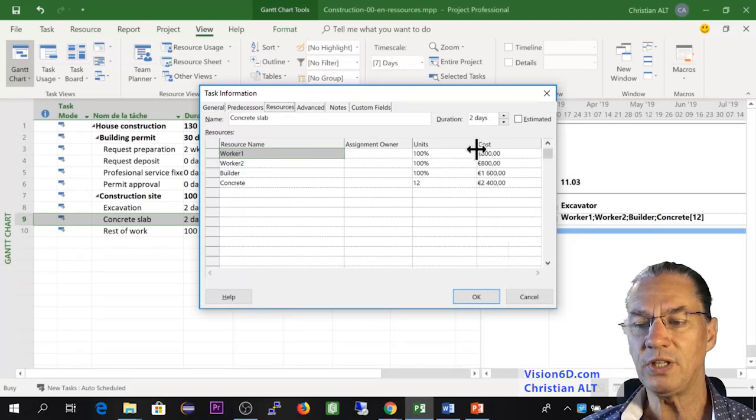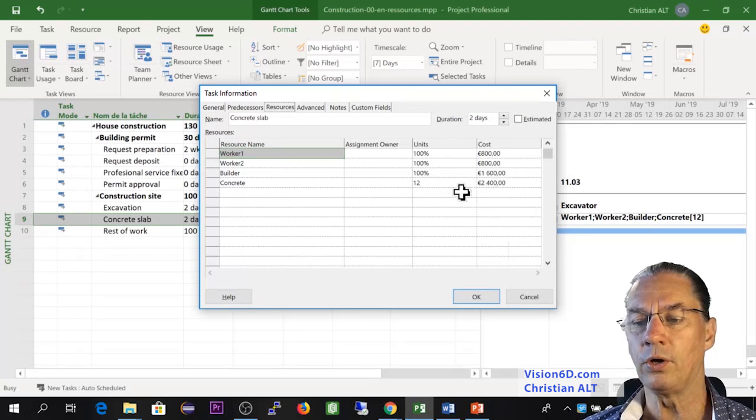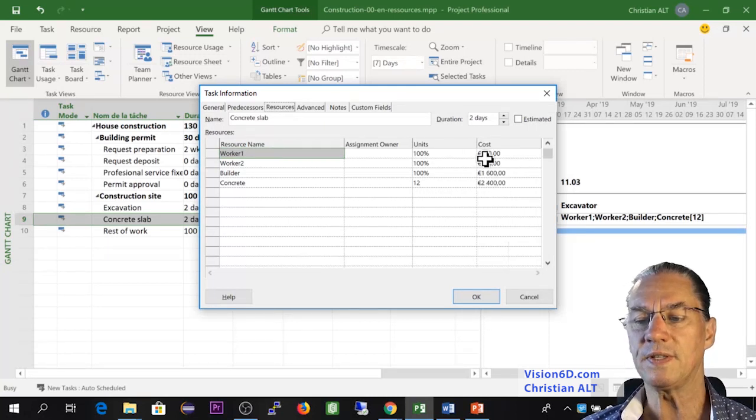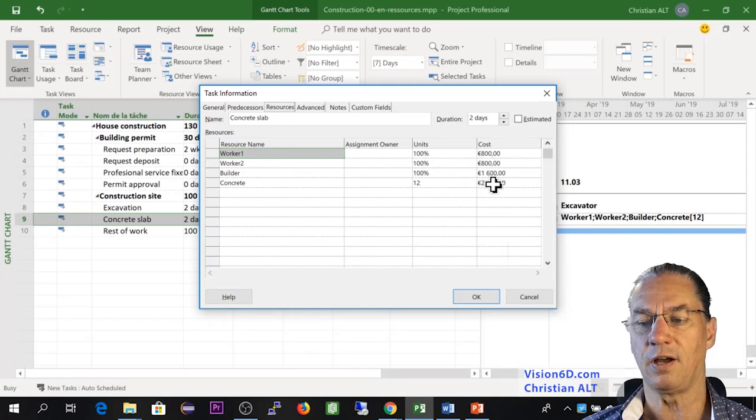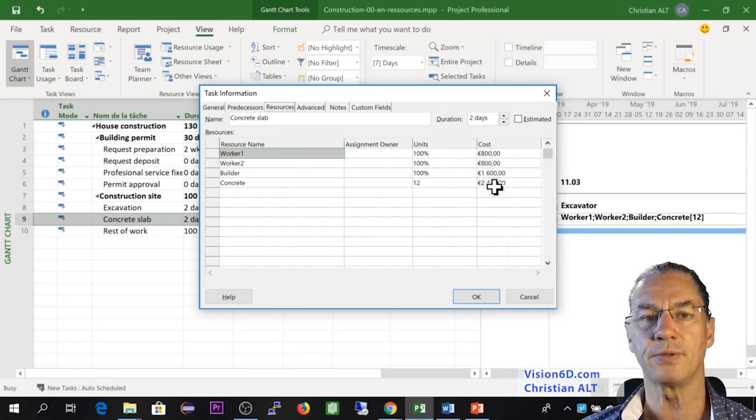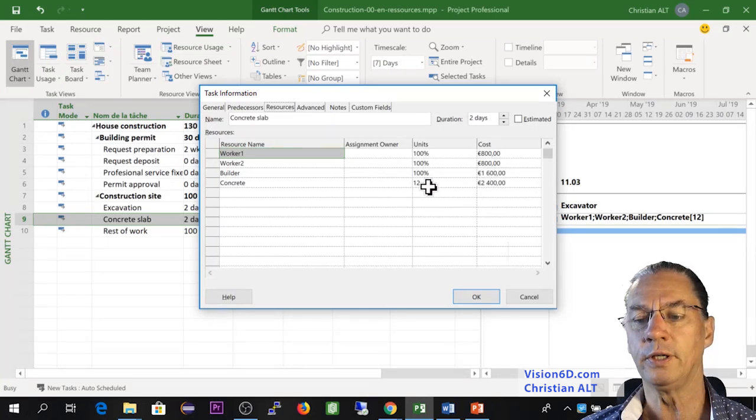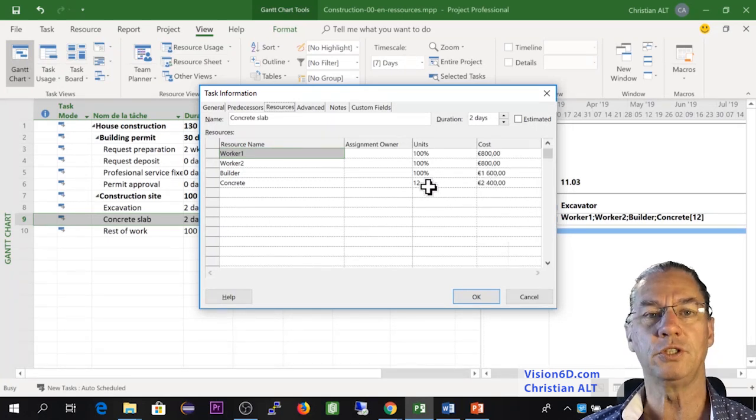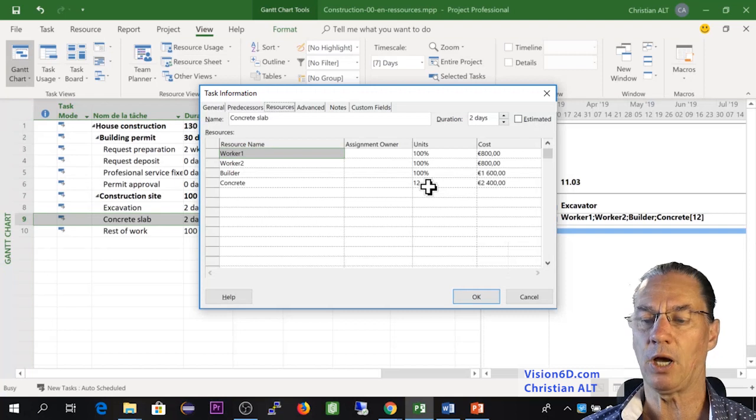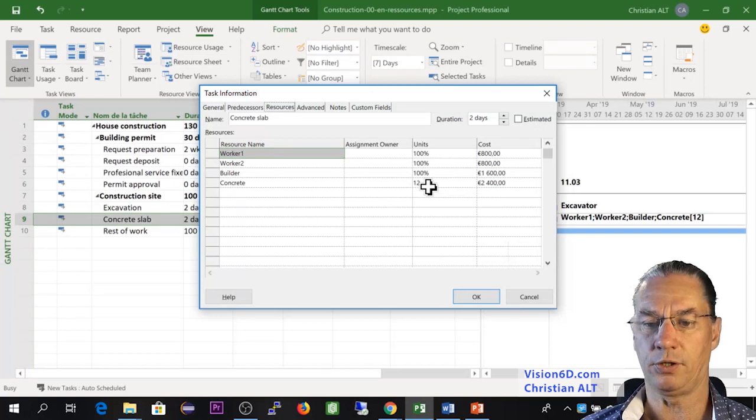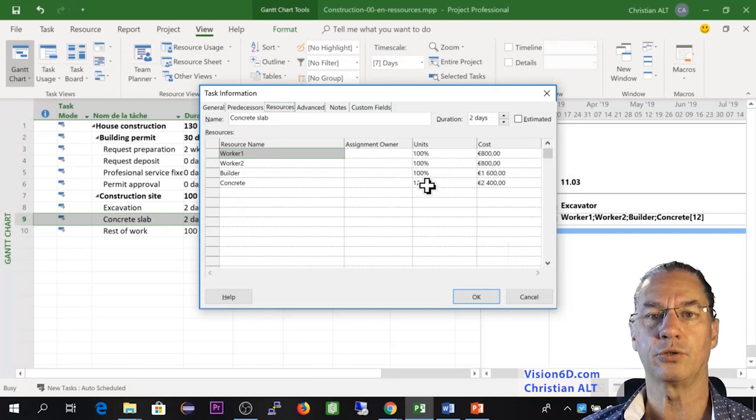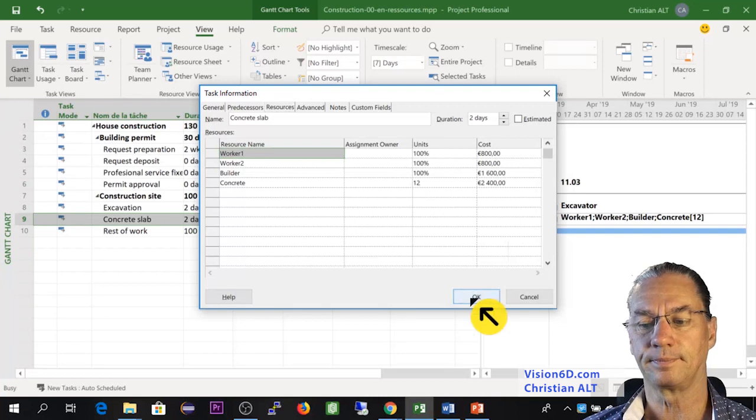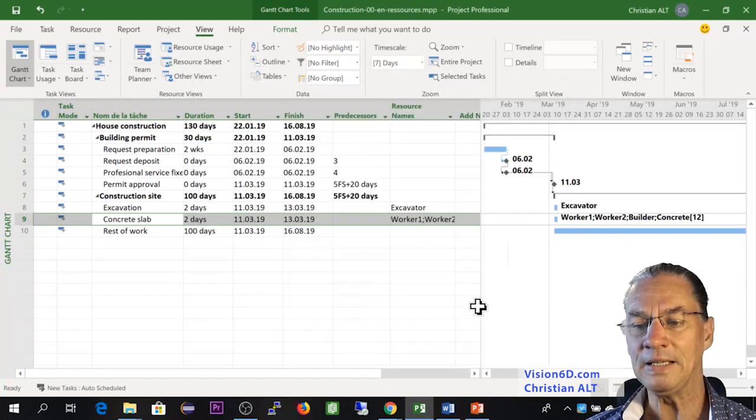So here, all in all, we see that there is a cost of 2,400 for the 12 units of concrete that were costed at 200 per unit. Now, I'm going to add here an additional column.